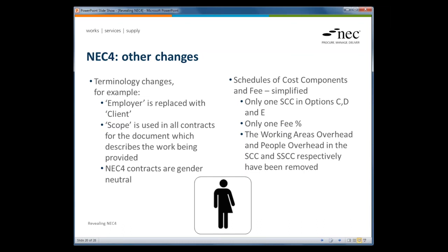Yes. And so the provisions you spoke about earlier in terms of trying to agree defined cost to a point in time, taking into account anything of a disallowed cost to get what is in effect a sort of mini final account for that. So that element of defined cost on a regular basis will occur now in all of these other contracts as well. Yes, of course, only on the cost reimbursable elements, not on the priced ones. Yes, so the C&E type equivalents.